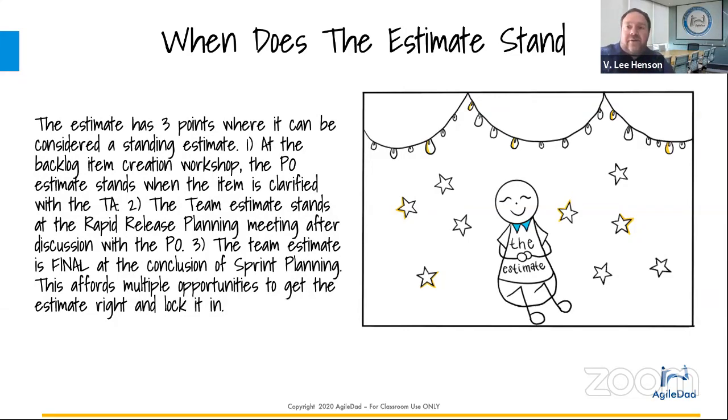And it's the product owner's discretion to say, I'll dedicate this many points towards discovery. And if they want to put time boxes around discovery, I am for that. So if they say, I don't want to invest more than 3 hours of discovery or 5 hours of discovery, I'm fine with that. And you can still put a point on it. It's just the point doesn't equal the time. It's just, this is how big of an effort this is, or this is how big they want it to be. But they just happen to put a time box on it saying, don't spend more than this amount of time, because I don't want to get to that point, right? I don't want to associate points with time.